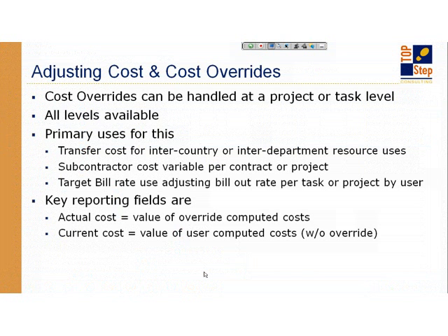One option that is used quite often is when there is an intercompany or a transfer cost. So a person could be borrowed from the UK to work on a US project, and their normal cost to the company may be £60 per hour. But there's an agreement that when the US uses them, the UK cross-charges them at a cost plus or a cost relief type rate. So they may be charging the US £70 per hour for the cost of that user. So it covers their salary plus any administration for the whole intercompany invoicing activity.